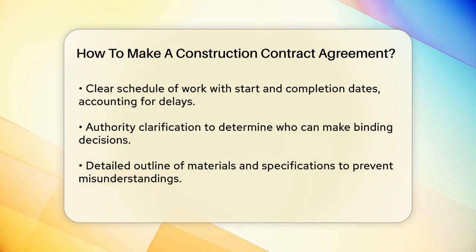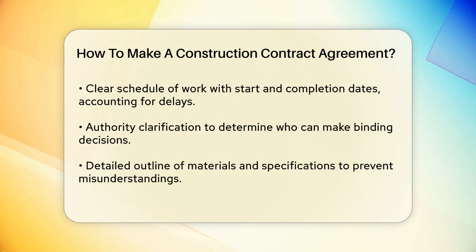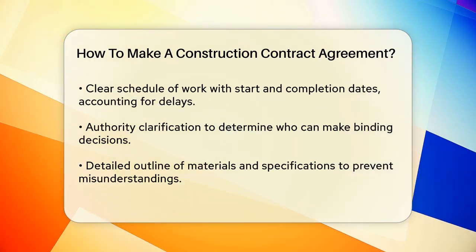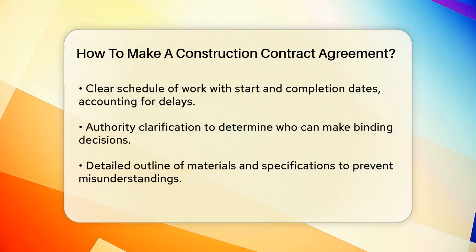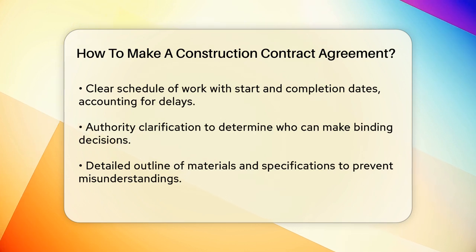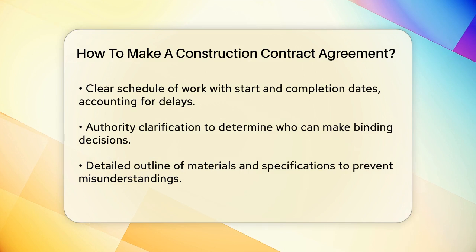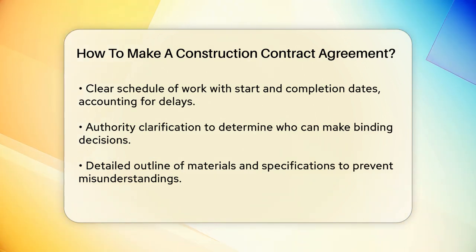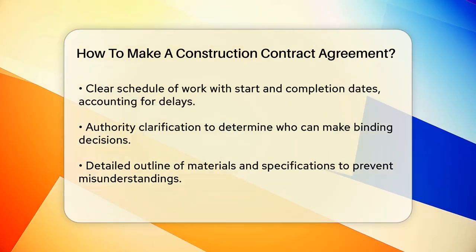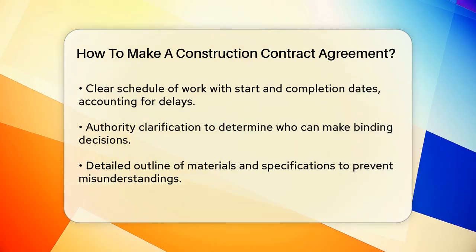A clear schedule of work is another vital element. This includes setting a notice to proceed date, a construction start date, and a completion date. Make sure to differentiate between calendar days and work days, and account for potential delays due to weather or other factors. It's also wise to include clauses that protect you from delays caused by the property owner or other external factors.